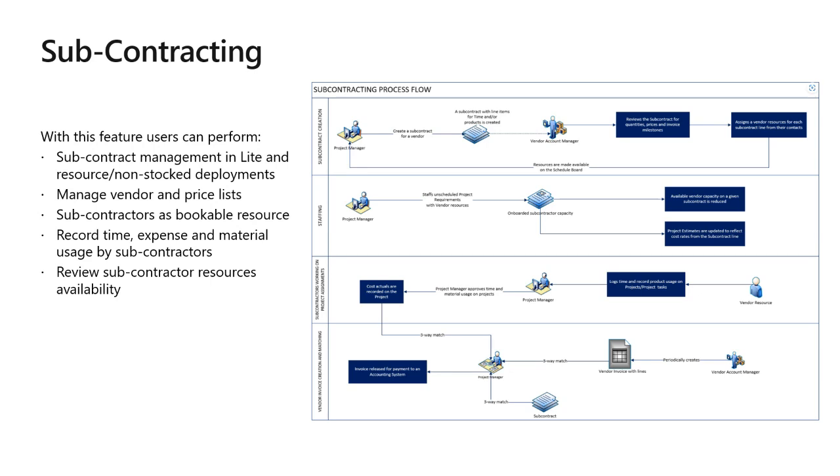You would then expect to later on receive a bill from them, and this would all be in the context of a contract that had been signed with the subcontractor, and that subcontract would be expected to control the pricing, the contractual arrangements, including pricing and billing and so on for that subcontractor. So obviously, some of these pieces were not very well integrated before, and this adds greatly to this capability.